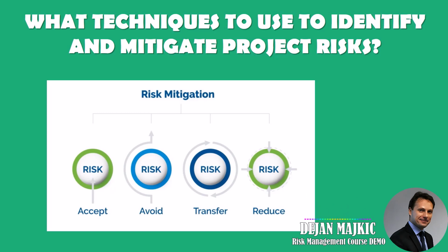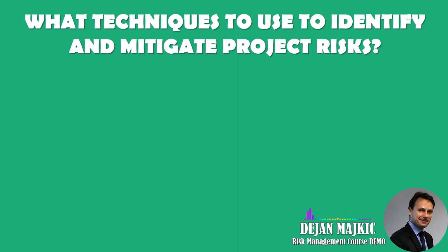In those sessions, you will understand who wants to own the different risks that you have and how you will have risk responses to those risks, including avoidance strategies, mitigation strategies, transferring risk, or just accepting the risk as well. You will better understand the impact and probability of each of those risks so you can assess what kind of response you need to tailor, who needs to own those risks, and by what timelines.